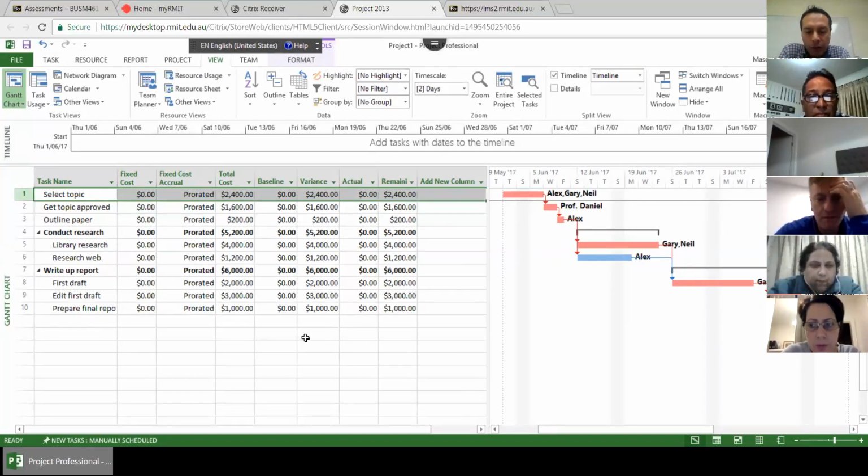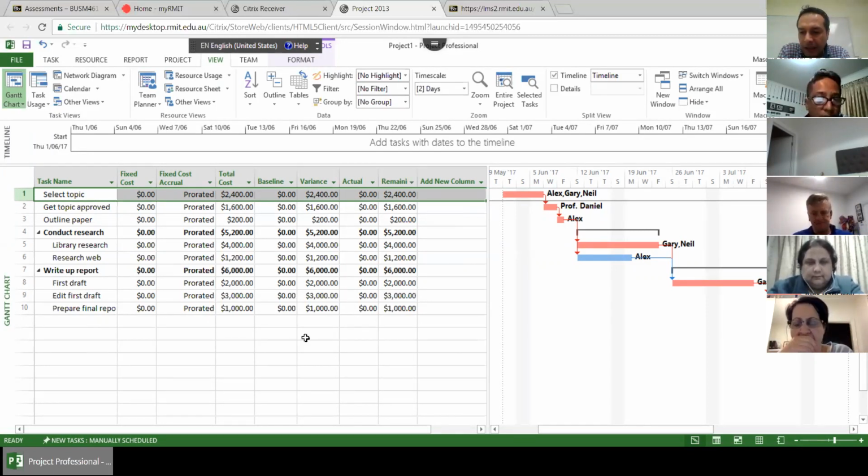For example, if you want to purchase 40 laptops, put the cost of 40 laptops. Or for example, you will give them an advance payment, 50% advance payment. So you will put 50% first in the start activity and 50% when they deliver the laptops or desktops. These are important for your cash flow table.